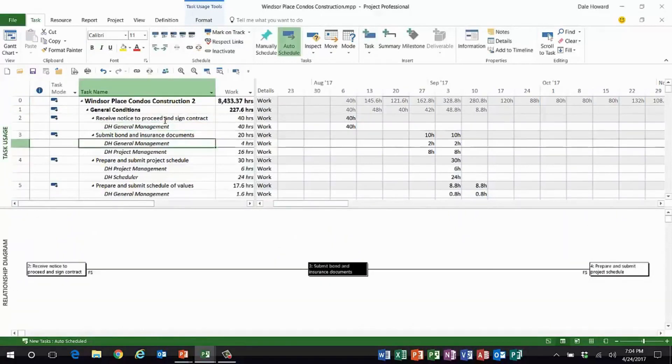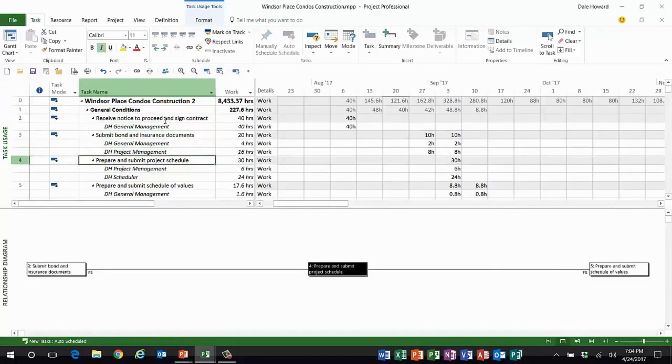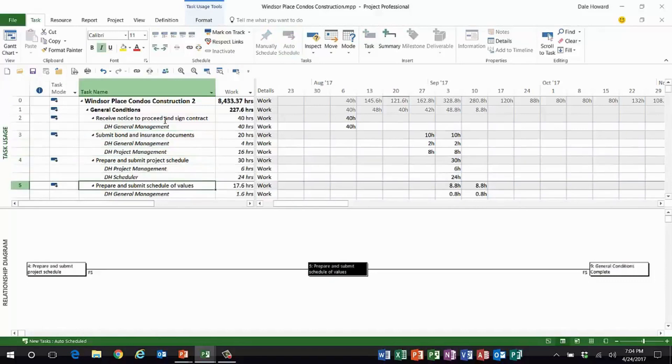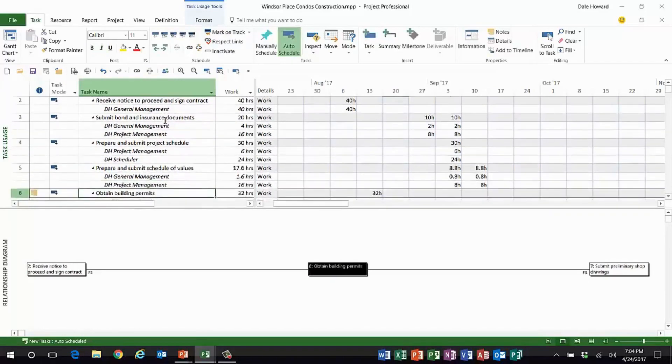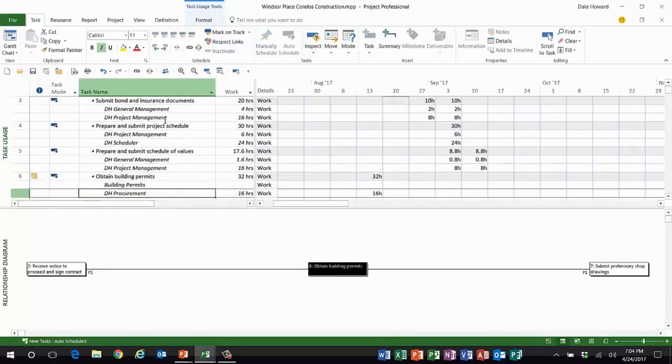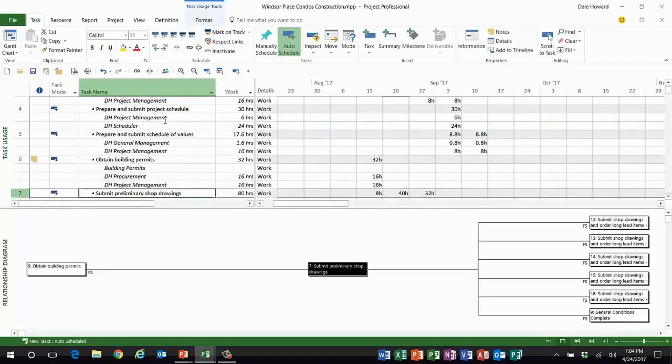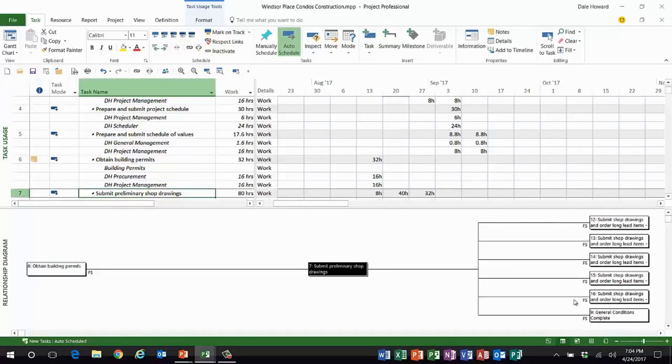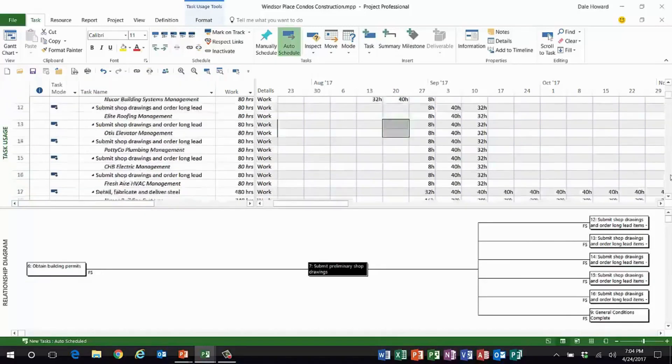Microsoft Project is identifying the list of predecessors and successors for each task in the project. For example, with task number seven, there's one direct predecessor and a number of direct successors.